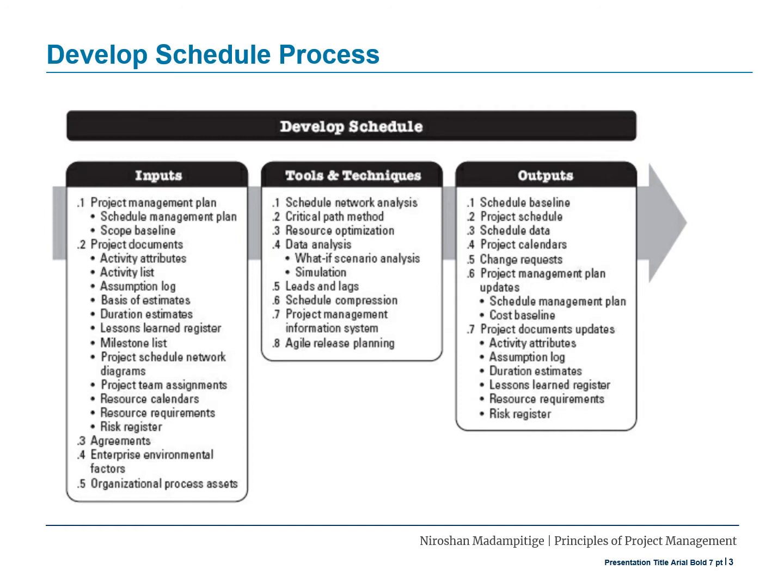The outputs produced by develop schedule process are schedule baseline, project schedule, schedule data, project calendars, change request, project management plan updates, project document updates.